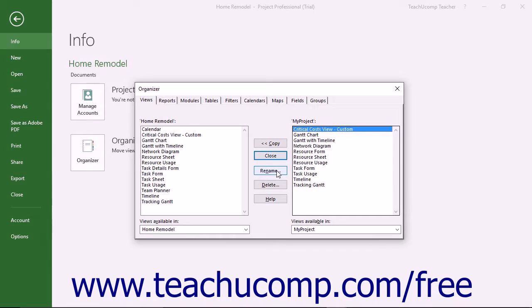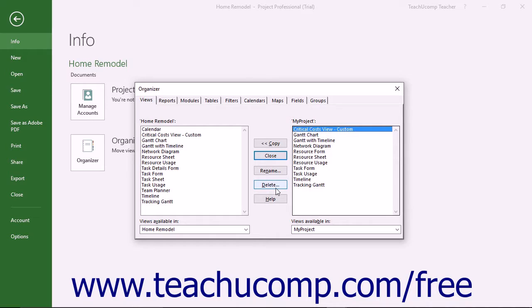You can also use the Rename and Delete buttons to rename or delete selected objects in the lists. This is a useful way to delete custom views you have created from the list of available views in a project file.